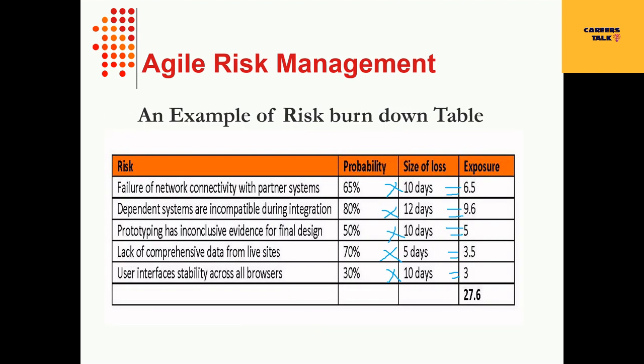The risk register shows us the detail for one potential risk to a software development project. But we also need a way to show all the risks in relation to each other. Using the risk register, we can create a risk burndown table that will eventually be used to create a risk burndown chart. We will discuss all this in detail in the upcoming slides.